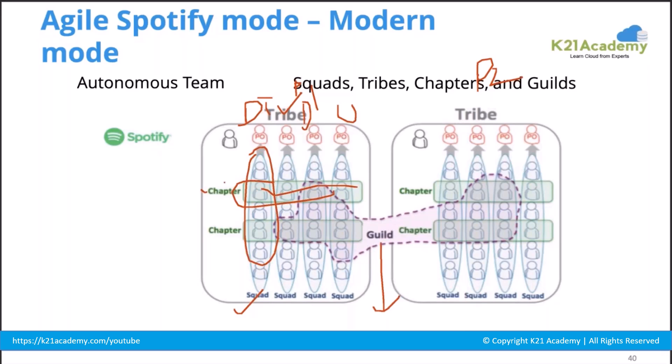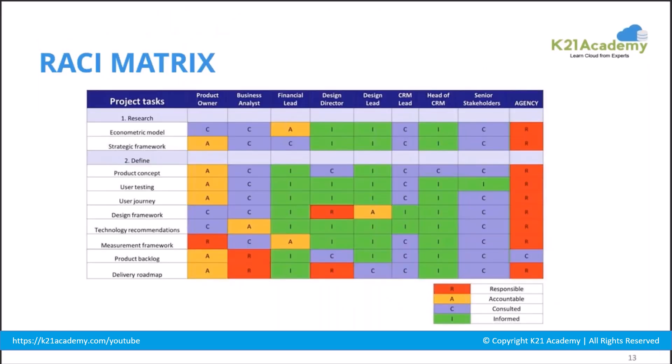At the start of a project there will be collective decisions where the team creates a RACI matrix — listing different task items, different teams, team members, and their roles. It defines who is responsible for delivery, who is accountable, who is consulted, and who is informed. This is done during initial project discussions at the start of the project.